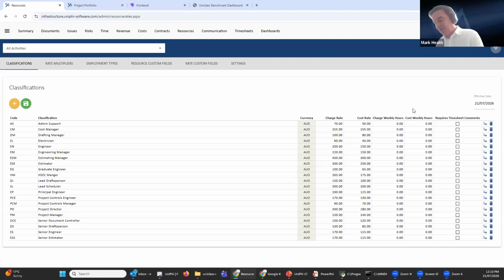So what it does is it transposes all of that information that sits in the timesheet audit into what we call a contractual billable table. And then when you raise an invoice, it captures that as a snapshot of what you've actually had at that point in time, because that can change. You can roll back a timesheet, you can change the rate history like I just did, and all of that data changes. And then you can compare one to the other and present to the client the fact that, you know, extra hours were booked for that time period, or the rate was incorrect and it was changed, and this is why the amount of cost on the project has changed.